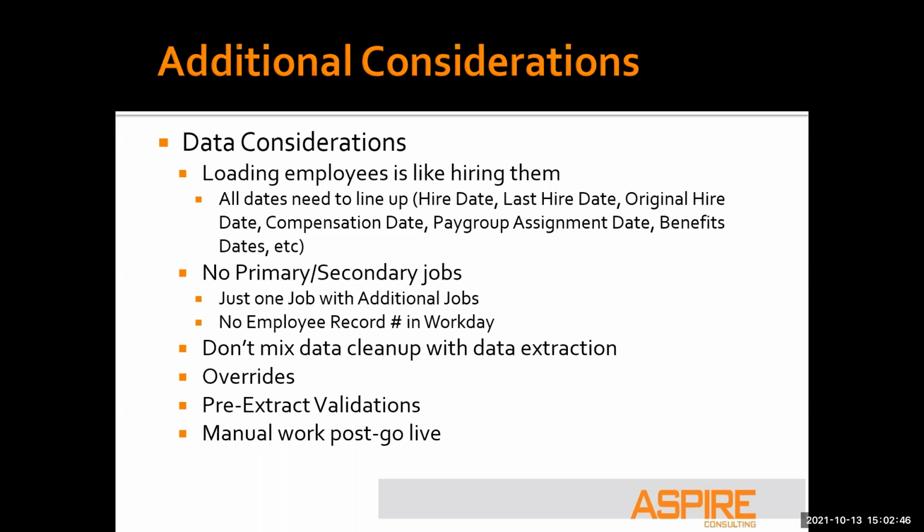Overrides: you can create date overrides. You can create overrides for anything, but if you manage and store those in a table in your environment where you're extracting data, you'll always have a record of, yeah, I know PeopleSoft says Ryan's hire date is January 1st, but we changed it to January 10th in our override because of some other data that we know about, and therefore now it's going to be January 10th in Workday. So keep that in mind. I've seen cases where we've said, oh, we're not going to need overrides, our data's good, it's all good. And towards the last minute, you're going, we need to create an override here because there's just no way to do this from a conversion perspective.